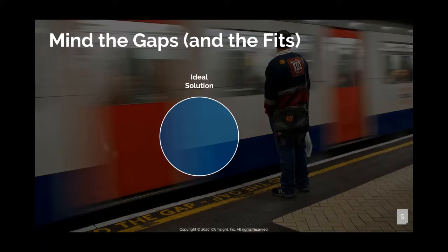As you look at one requirement, one problem you're trying to solve, and remember, you're going to be trying to solve a lot of them by different personas, so breaking them down one by one, for some of them you'll say, let's do a gap analysis on it. A gap analysis says this: here's what you told me. This blue ball is what you told me you want to accomplish. Everything in that blue ball is everything you would like to do. And by the way, our current investment in Dynamics 365 can do this out of the box.